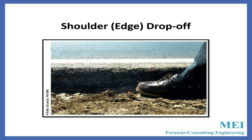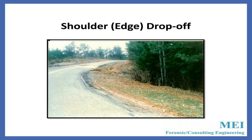Remember, two inches is the general rule. Some states allow three during construction, but the general rule is two inches. Here is another shoulder edge drop-off case I worked on — you can see the mud and how that shoulder on the left side just drops off. This caused a dump truck to roll over into the woods because of the shoulder condition.